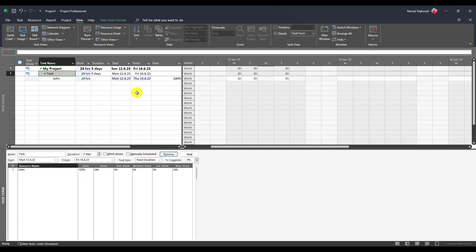You will see that this task has five days duration and John is going to work 24 hours Monday, Tuesday, and Thursday. Why? Because he is off on Wednesday and Friday.